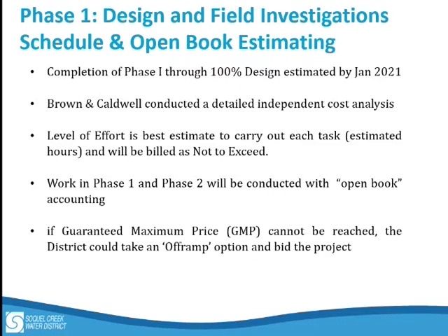We looked at their proposal when we got it, and we did an independent cost analysis, and we believe that the level of effort is adequate and it'll get us through this phase. We do like to remind the board that this is a professional services contract, and they will be billing on a time and materials basis, and we'll be looking at all the invoices and working with them to make sure that it is adequately billed.